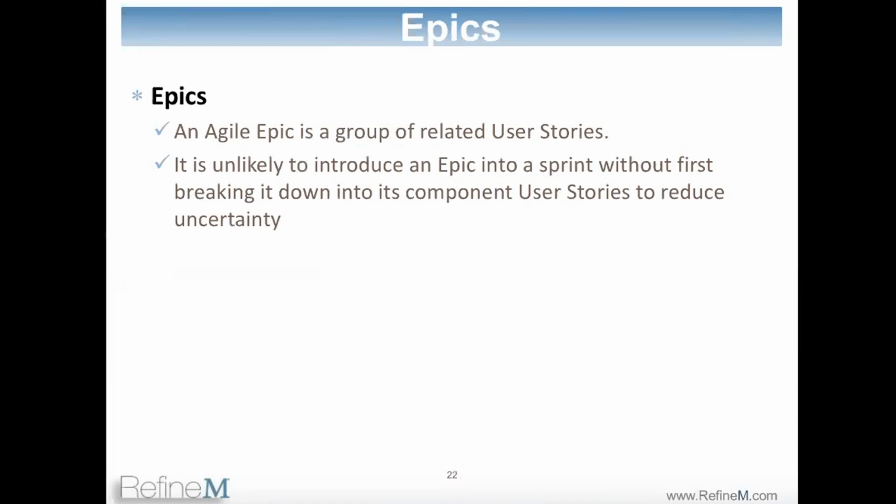Now, sometimes it happens that at the end of the sprint, you have unfinished stories. You might have seen that. Does that mean those stories are epics? Not necessarily. It depends upon how the team works on those stories. What is the capability, do they follow the INVEST criteria, are they dependent stories. So there are a lot of factors that come into play. So usually, if a story follows the INVEST criteria, then it is a story, because it's going to be small, it's going to be independent, it could be finished in a sprint. And if that story is unfinished, that's okay, it may not be an epic.